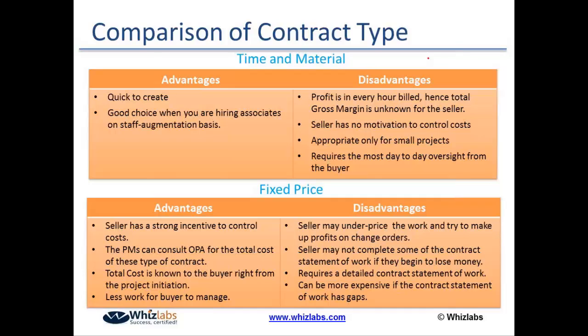Also, if the seller finds out that the cost is not adequate and he's running short of budget, he would try to cut down on quality or scope, so that becomes another concern of the project manager. Right?